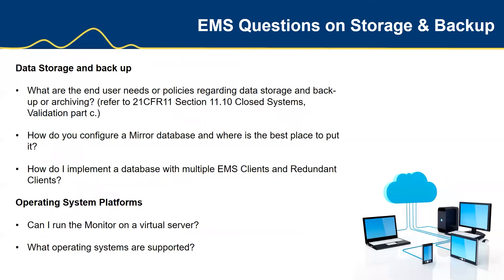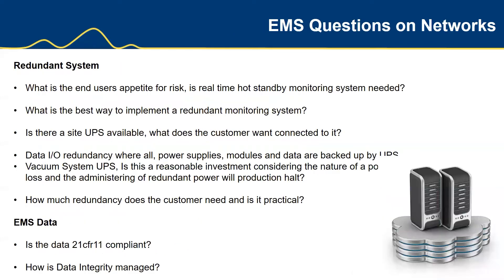Looking at data storage and backup: what are the end user's needs or policies regarding data storage, backup, or archiving — referring to 21 CFR Part 11, looking at closed systems, validation, and business continuity? How do you configure a mirror database and where is the best place to put it? How do we implement a database with multiple EMS clients and redundant clients? Looking at operating system platforms: can I run the monitor on a virtual server? What operating systems are supported? Regarding redundant systems: what is the end user's appetite for risk? Is there real-time hot standby monitoring needed? What is the best way to implement a redundant monitoring system? Is there a site UPS available? Where are all the power supplies, modules, and data backed up by the UPS? Is there a reasonable investment considering the nature of potential loss and the administration of redundant power? Will production halt? How much redundancy does the customer need and is it practical? All these questions need to be asked.